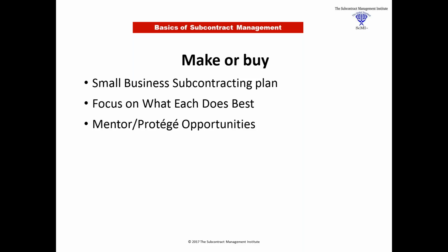And so the government doesn't make as much as it used to, but it does have certain rules about using its own people for certain services. And particularly when you get into those especially governmental functions, those have to be done by government employees. But the government still has a make or buy system. Now contractors, on the other hand, also do a make or buy analysis, and they decide whether they can handle it internally or if they should give it to a subcontractor in an effort to get perhaps somebody more expert in that particular field, or somebody who has patents on certain of the material that is going to make the end product that much better.